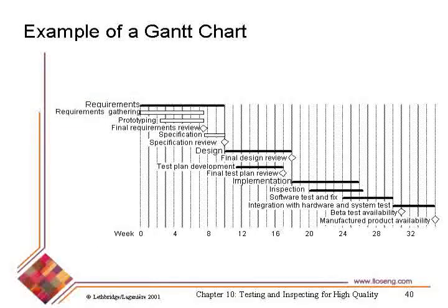the same activities, the same tasks that showed up on the PERT chart, but now we're laying them out with start point, end point. We can lay these out according to when we plan to start, when we plan to end, and later on as we miss deadlines or as we get things done early, we can adjust those start points and end points and shift these lines backwards and forwards. So diagrams like this then give the team members and the managers a glance at how we're going to manage this entire project, and just like the software architecture, they give us a global view of things. In this case, a global view of the management, whereas the architecture gave us a global view of the design.